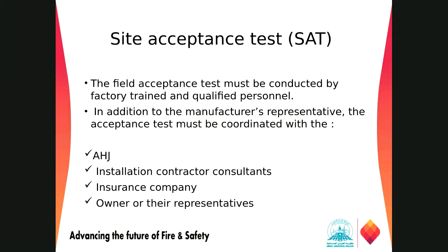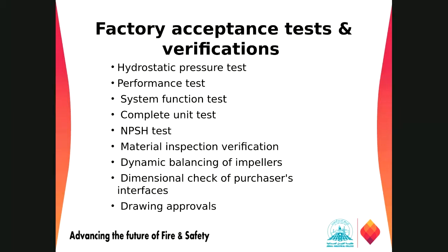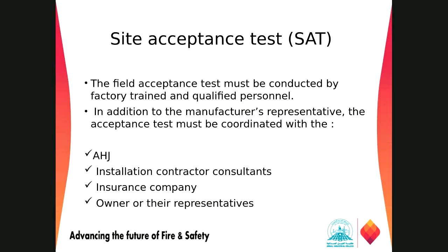Now we have the site acceptance test, right? These are the ones we discussed in the beginning, which are the factory acceptance test and verifications. All that information we have to collect from the manufacturer of the pump, right, for reviewing the pump unit. And then we have the site acceptance test, right? The site acceptance test should be conducted by a factory trained or qualified person. Always remember that the first site acceptance test should be done by the factory personnel from where we got the fire pump unit, and the qualified person along with that one.